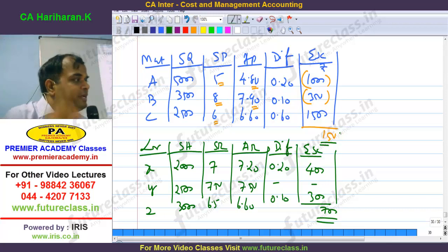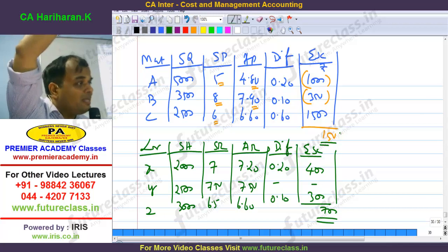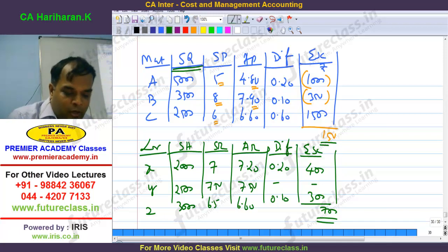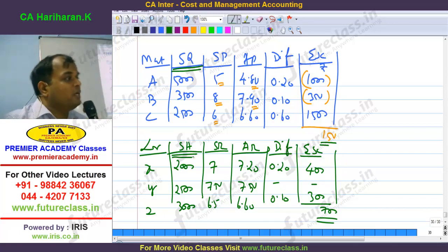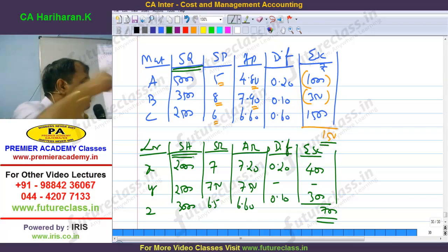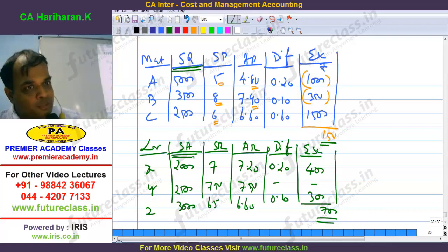Right? Therefore, escalation clause is only the changes between rate, standard rate to actual rate. Which quantity you have to take? Originally, I will agree. But the original rate is called expected standard rate. So, expected standard quantity on that rate. Therefore, only standard quantity will apply. Only standard ask will apply. What will not apply? Actual quantity will not apply. But rate, the difference in rate you have to take. Understood? That is what the expected questions from your answer. Okay? Comfortable? Okay? Now, shall we go to the next one?